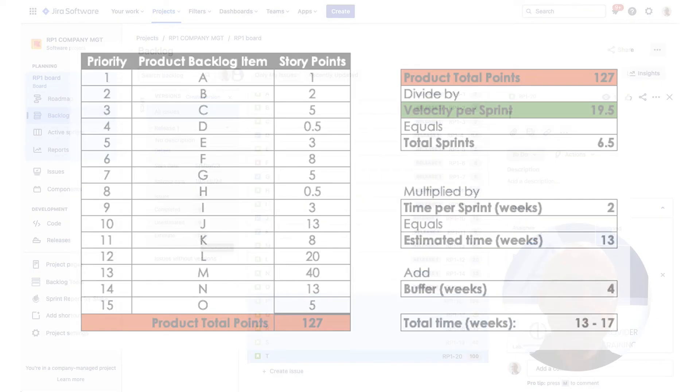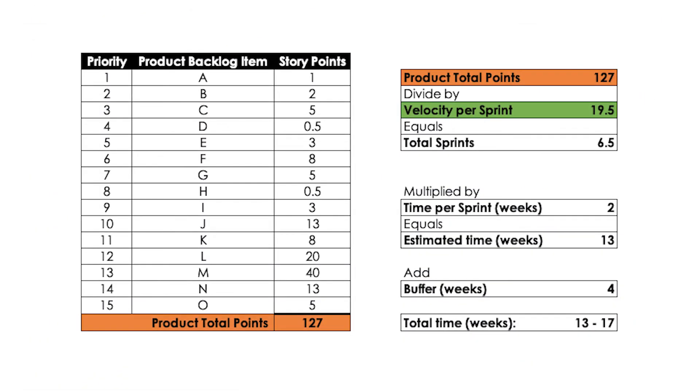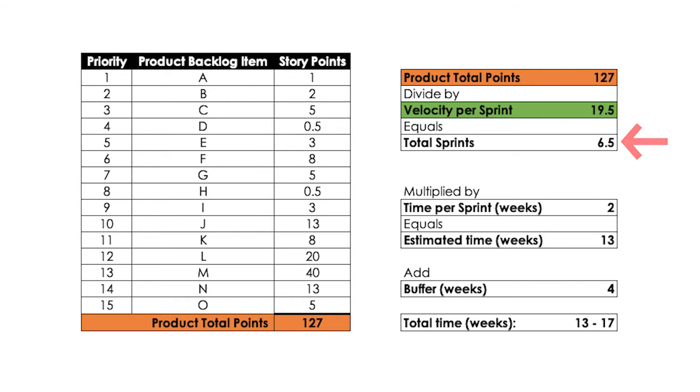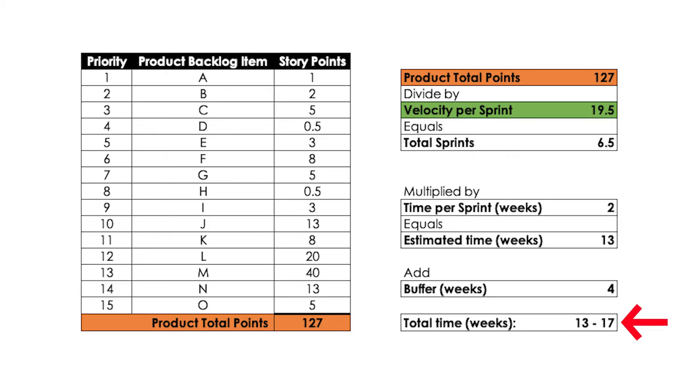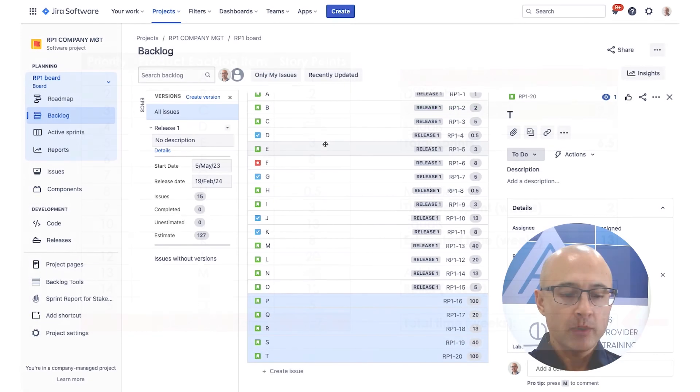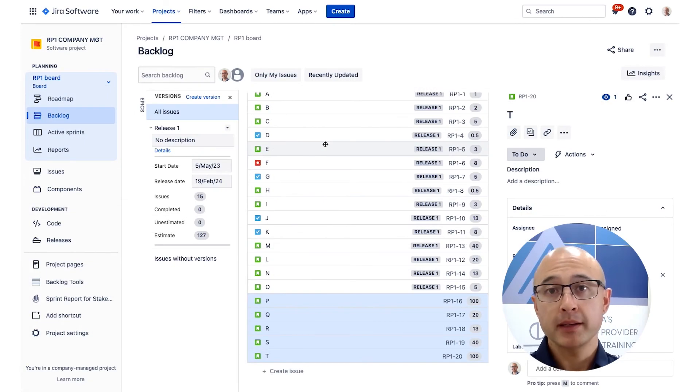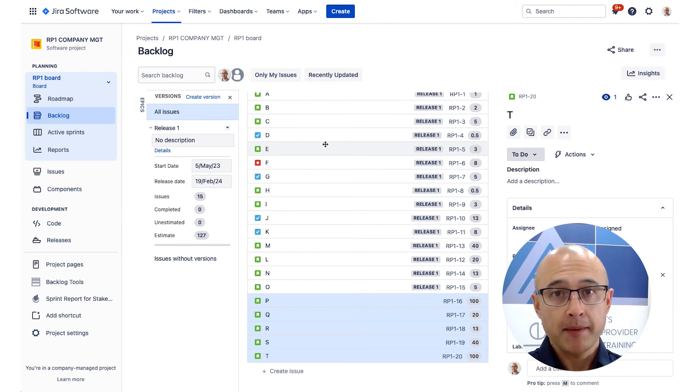So how do we do it? Well, like we did before, we're going to take the total number of points, 127, we'll divide it by our team's velocity, 19.5, and you'll discover that that comes out to be about 6.5 sprints. We then multiply it out by the length of the sprint, two weeks, we get 13 weeks. We readjust our buffer, let's imagine we'll put in four weeks. And there we go. We get a timeframe of about 13 to 17 weeks or three to four months or so. So we can go back to our stakeholder and say, okay, are you happy with this plan? Our first release is going to take this amount of time, and we are aiming to deliver A through to O. So that's how we would come up with a scope-based release plan.